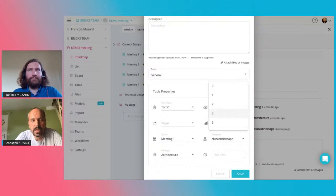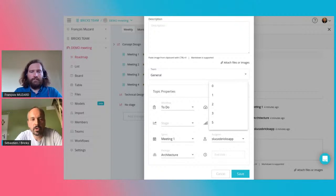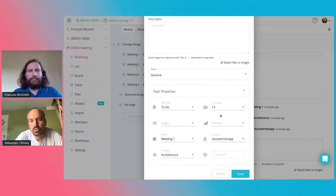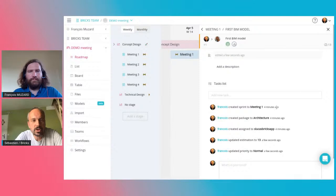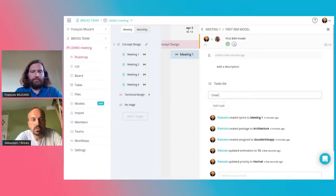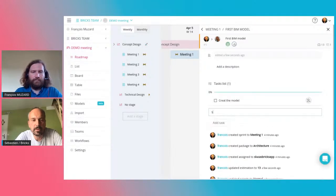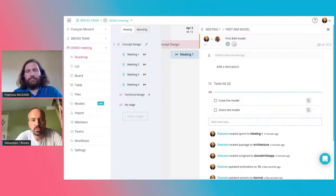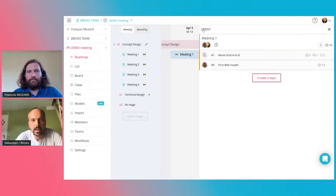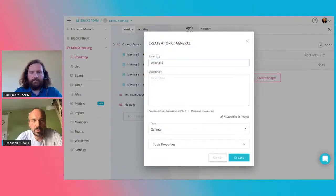If a task scores bigger than 21 points, you need to split it because it's too big — it's not possible to complete it in one sprint. The idea is to identify when a task is too big. Also, if a task scores 1 or 2 points and can be done in one day, it's better to just do it even if it's not high priority. This estimation is discussed with the team — it's not the role of the project manager alone to decide. Generally it's a discussion at the beginning of each sprint, where team members exchange opinions and converge on a view of the complexity.